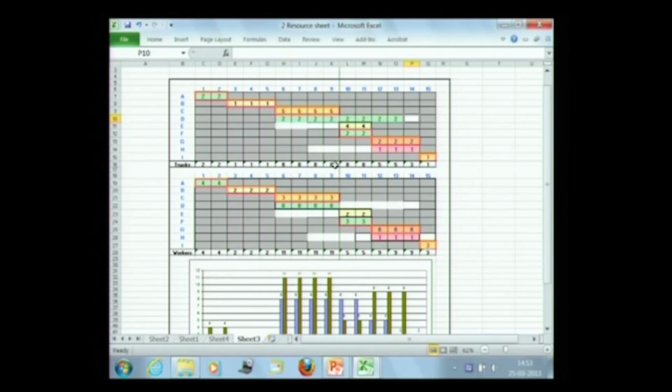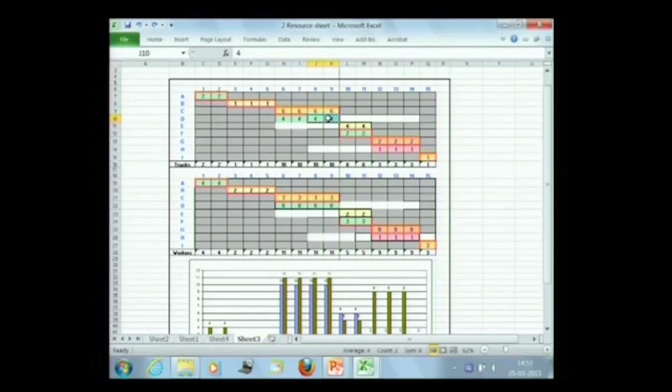But it's a potential strategy which a project manager might choose to use, and this happens in reality. Okay, something is not available, they say let the activity continue, but we will continue it at a slower pace, but the quantum of work will take longer to get done. Okay, the other option, like we said, is to take the 4 from here.